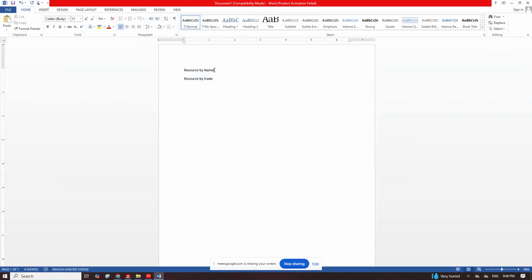Okay, so there's what we call resource by trade. Under resource by trade, you group people together. Let's say for instance, your project manager asks you to resource your schedule and recommend how many persons will be used for the project. You cannot assign only one filter to do a job. You can put one welder, but you can't assign only a mason's helper to go and lay block. It's not possible. So you can now resource them by trade.